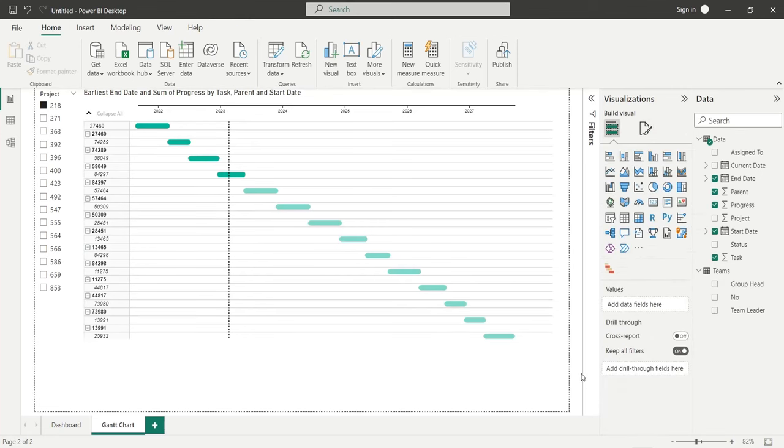This looks much better. Now you can see the entire chart without scrolling. The vertical line is the current date. If progress is ahead of this line, the project is efficiently being completed. Otherwise it is slow and we are falling behind the deadline.